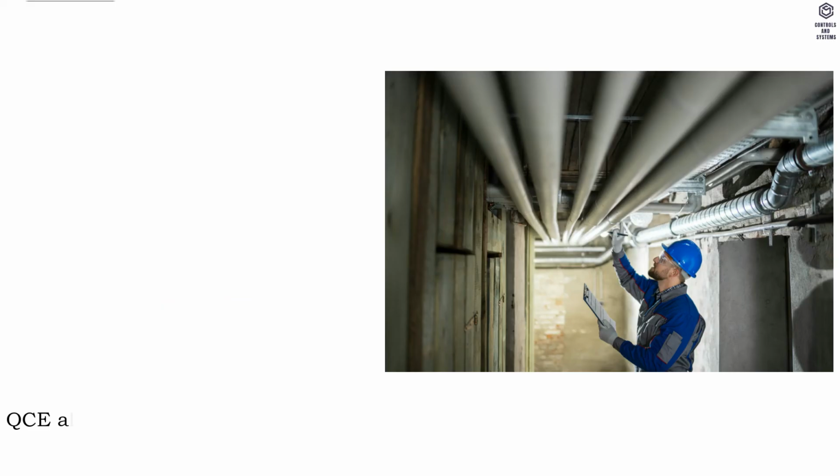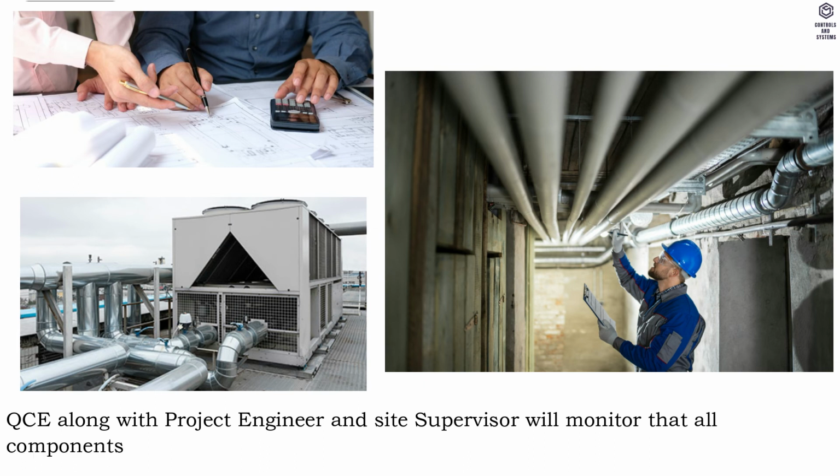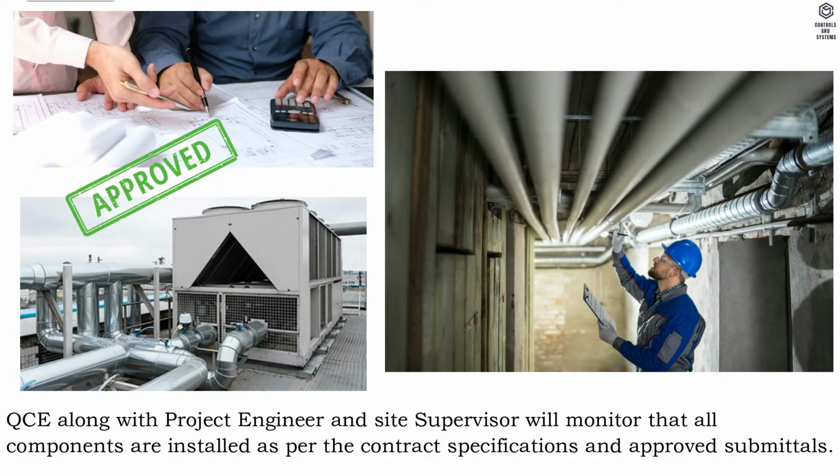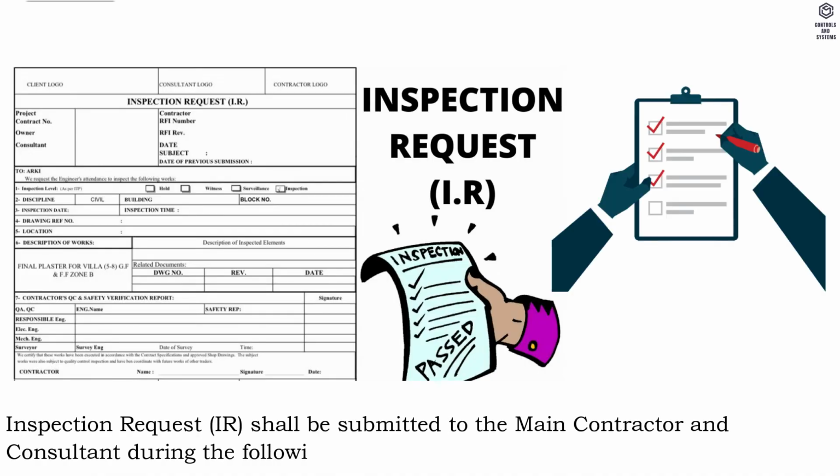Quality control. QC along with project engineer and site supervisor will monitor that all components are installed as per the contract specifications and approved submittals. Inspection request shall be submitted to the main contractor and consultant.